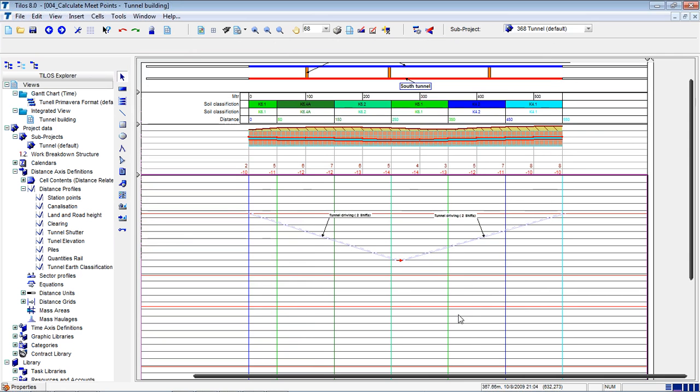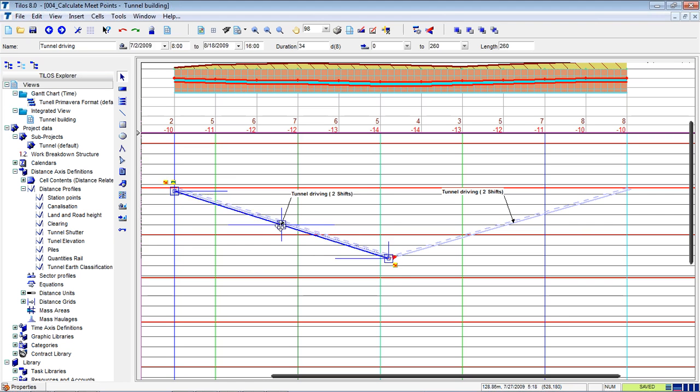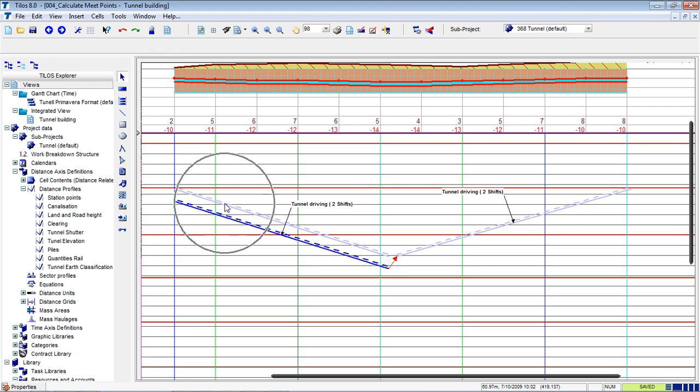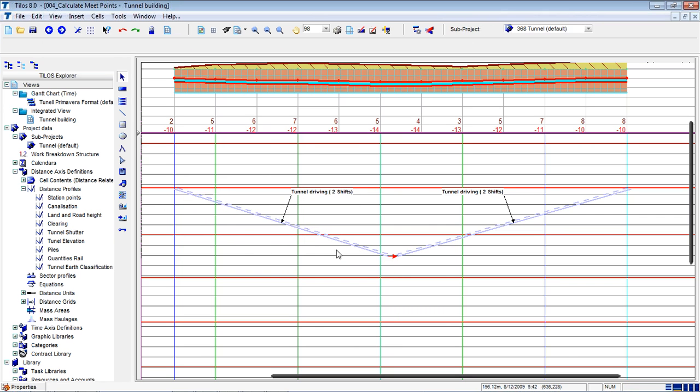You can see that I have the baseline here, and when I select this activity and move it, the transparent one in the background is showing me the tender program, which we call the baseline program, and it cannot be edited from here. This one is just a forecast, and everything is okay now. This is the same.